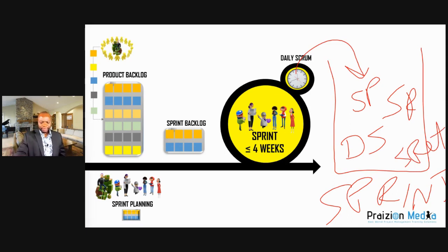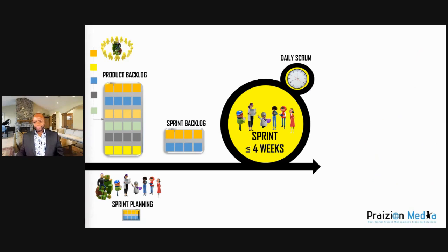So I'm going to show you how the others come in. So now you know about sprint planning and the sprint backlog, and you know what a sprint is. It's an iteration. So the iteration is a time box within which everything else fits. And like I said, we have a daily Scrum, and this is where the team syncs up to plan for the day ahead. And it is very helpful to know what your colleagues who are developers have completed, because maybe it frees you to work on something, or it prompts you to work on something.